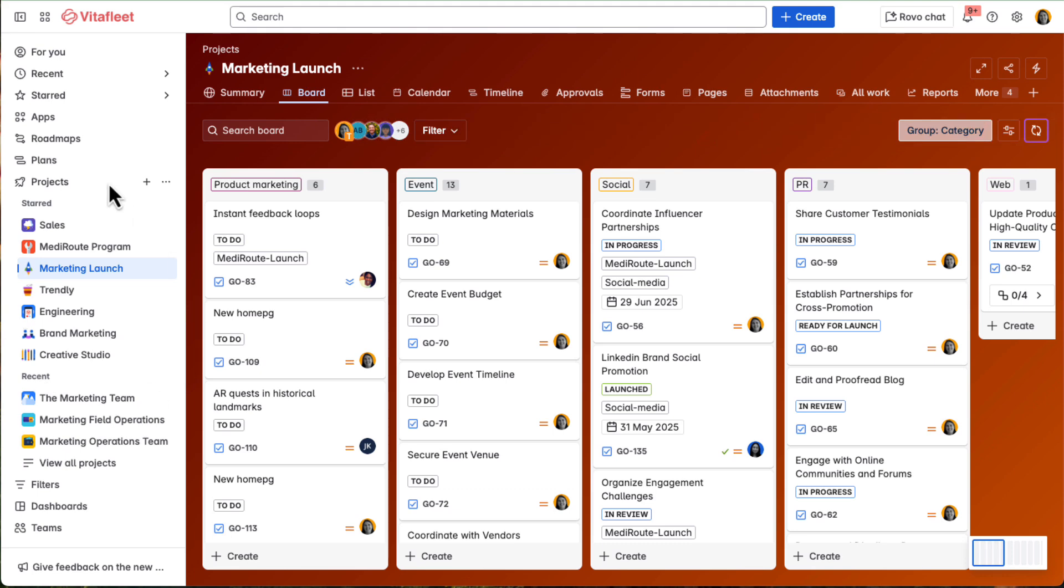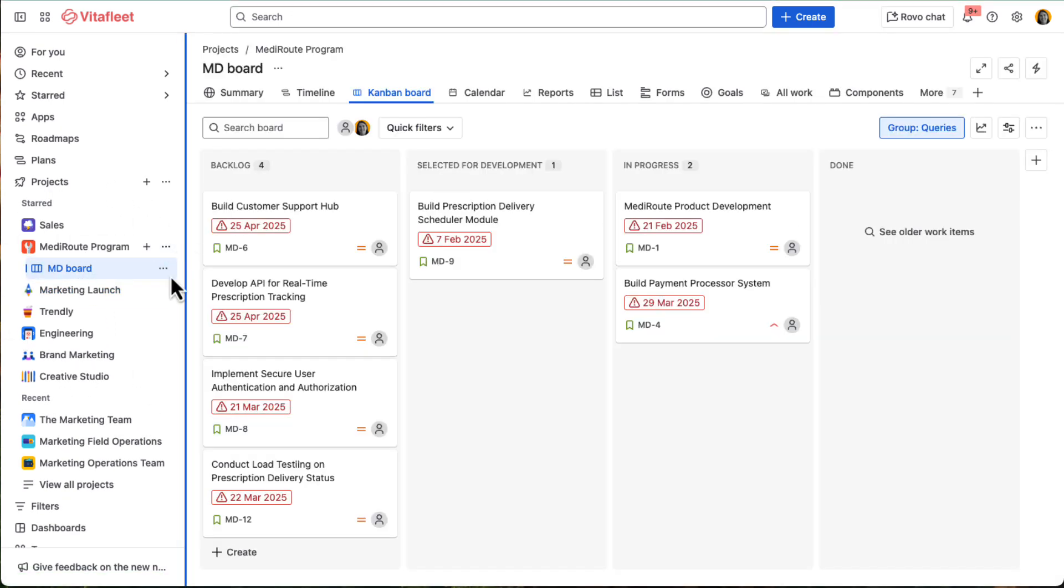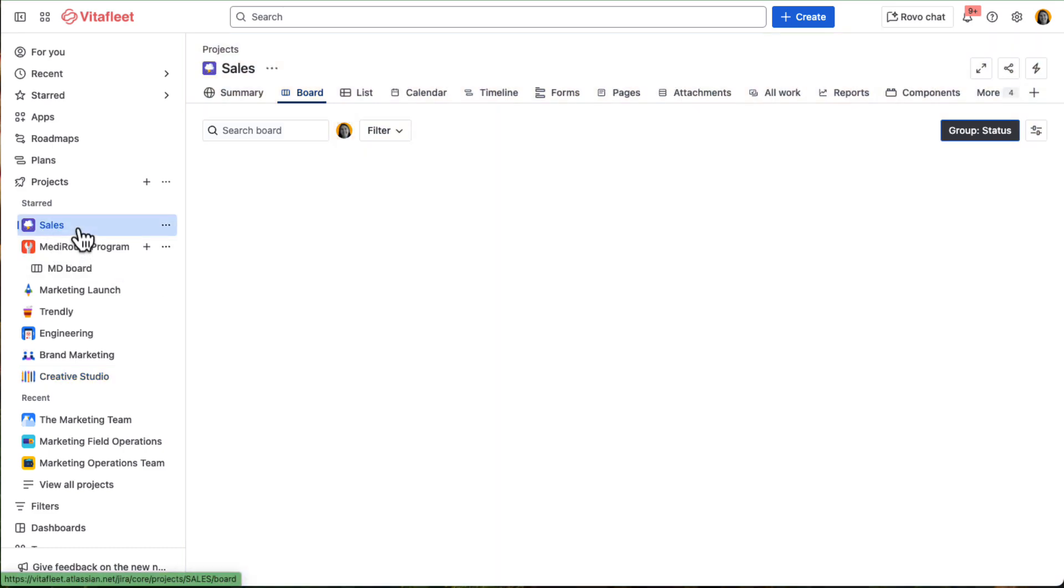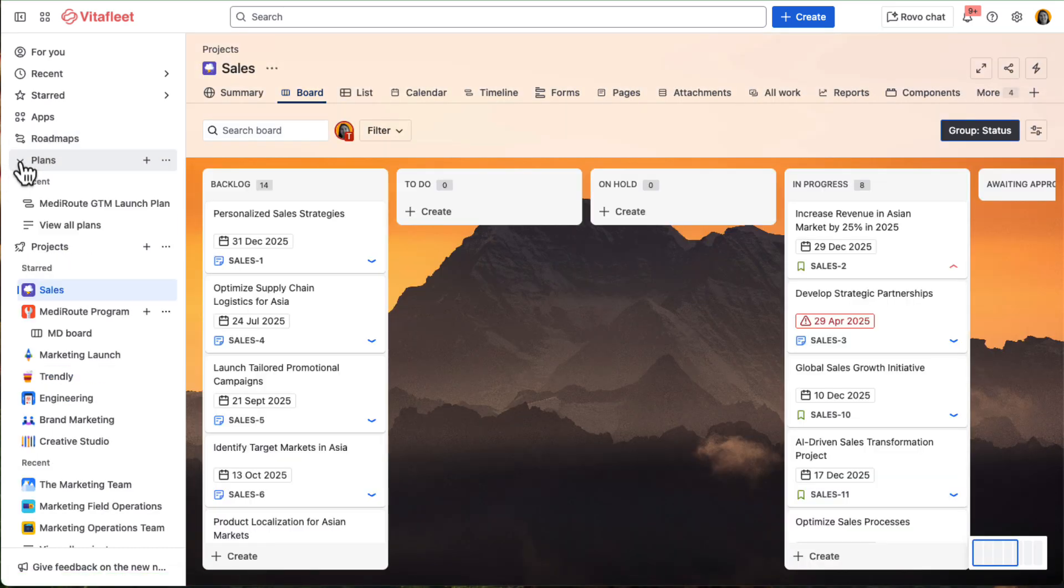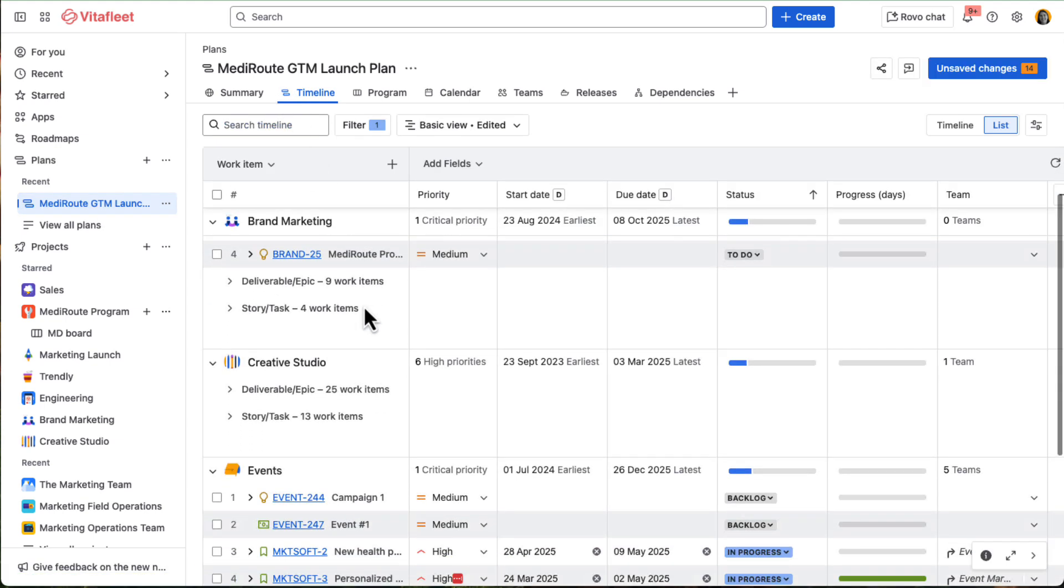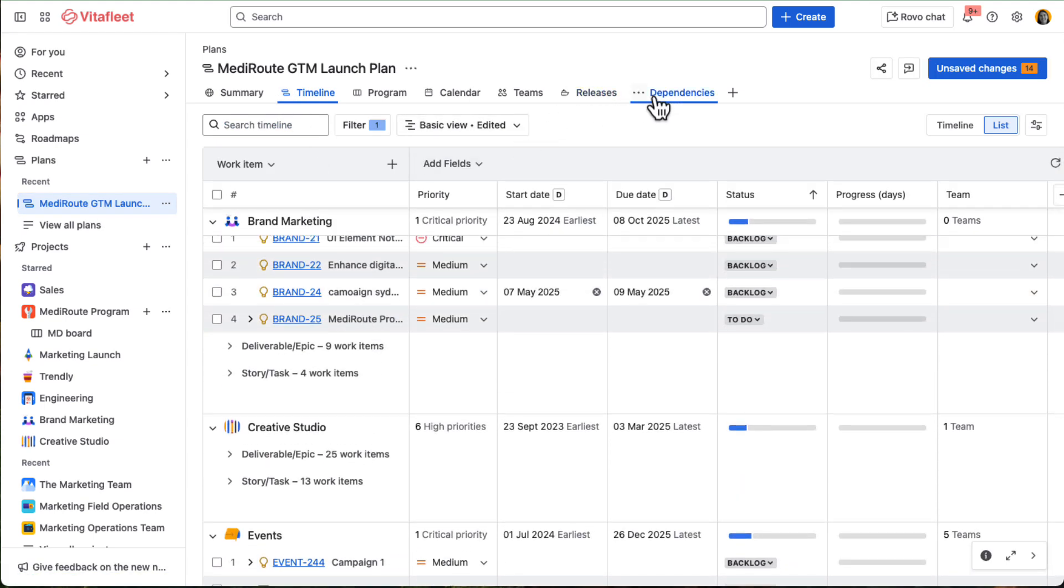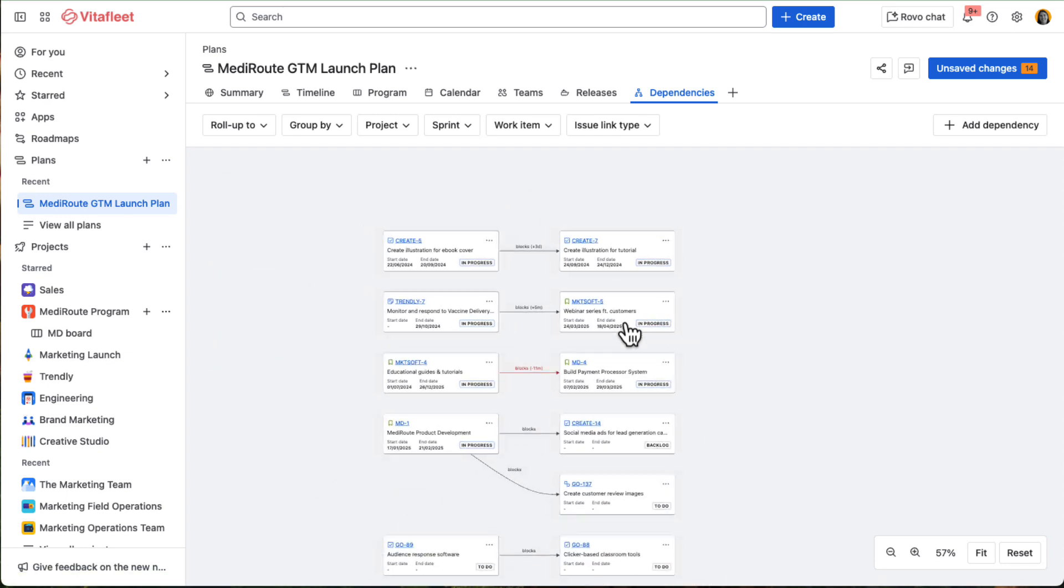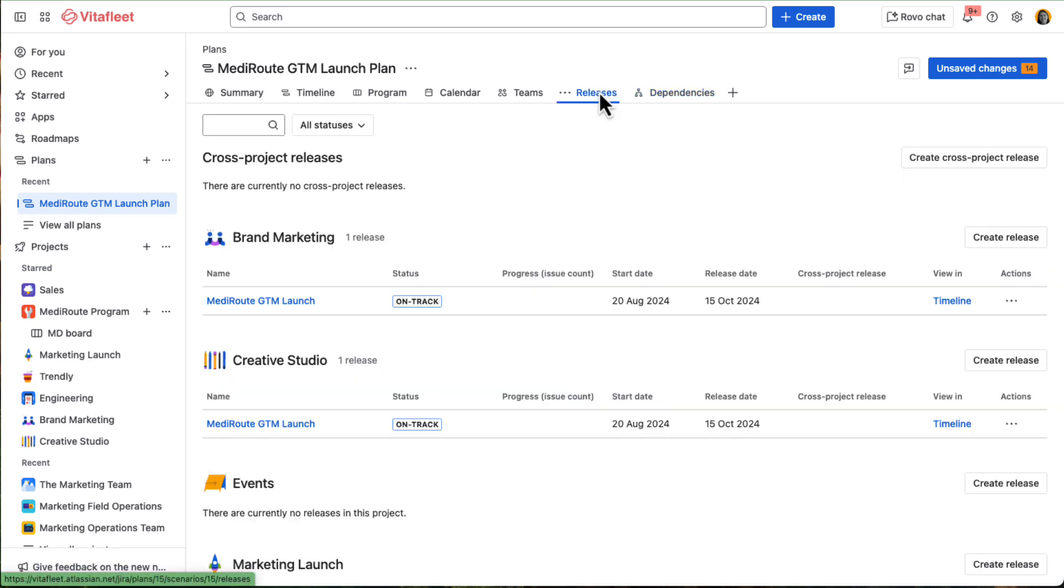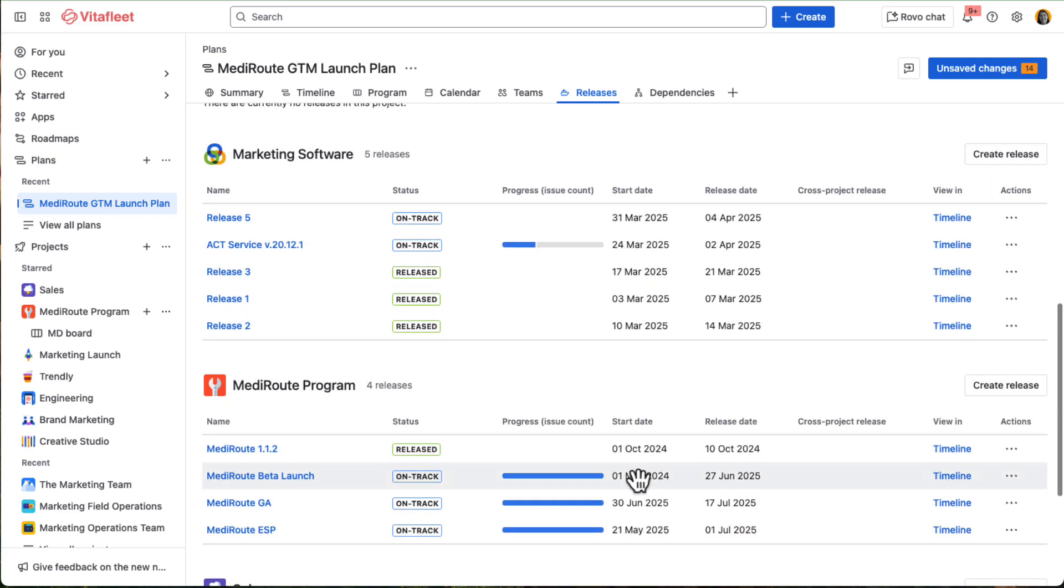Since the MediRoot launch involves multiple teams, product and engineering's MediRoot program board, creative, and sales, Tracy uses plans to keep everyone aligned. From one view, she can see what's happening across all work streams, flagged dependencies, and tracked shared release dates, so the GTM plan stays in sync with the product timeline.